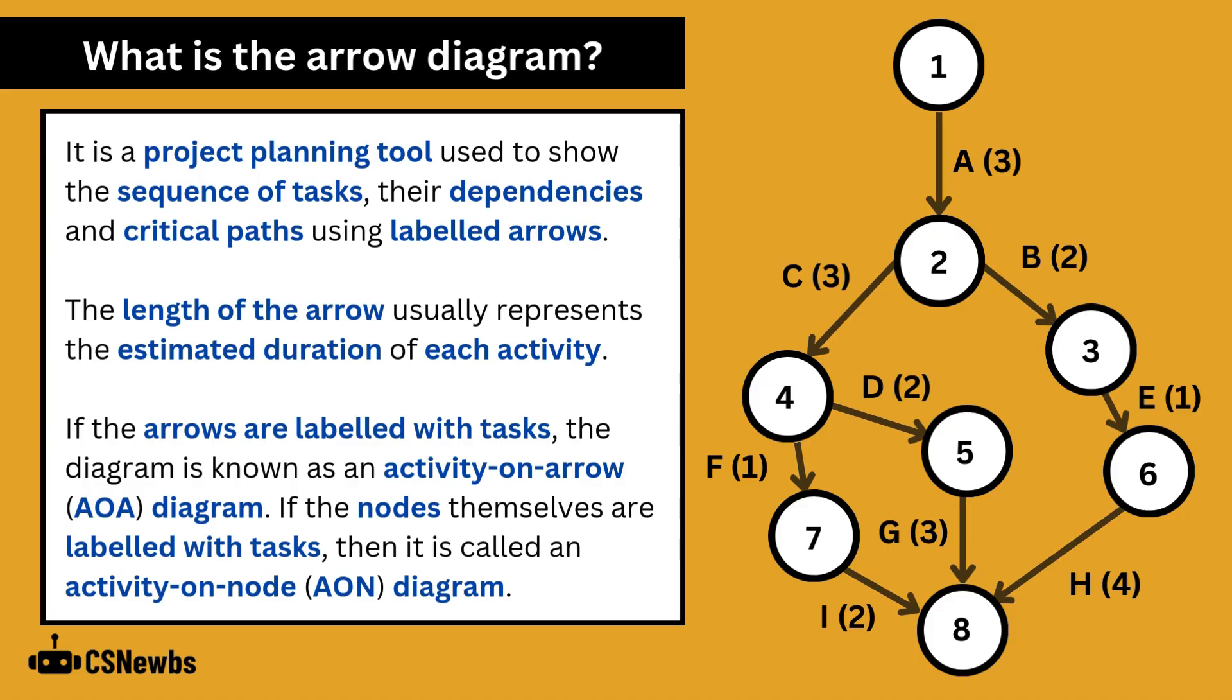If the arrows themselves are labelled with tasks, the diagram may be known as an activity on arrow diagram. If the nodes themselves are labelled with tasks then it's usually called an activity on node diagram.